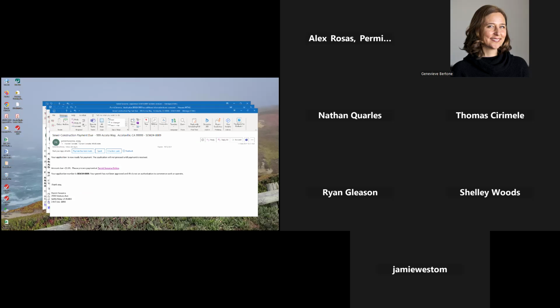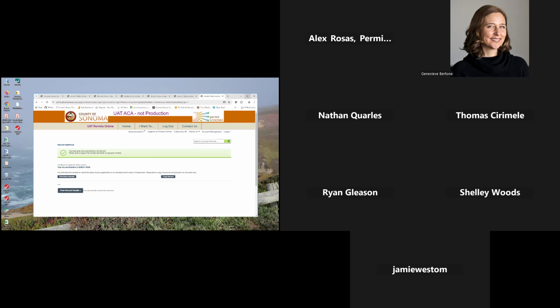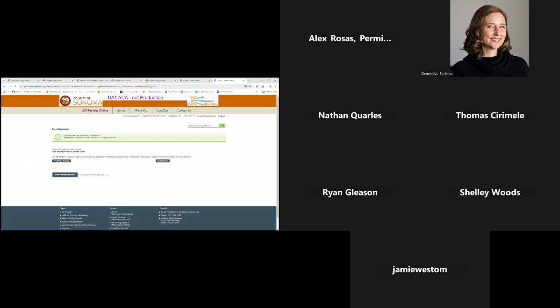While Tom is doing that, I'd like to take a moment to mention, occasionally we may have staff that process things out of order. They may invoice fees at initialization, but don't move the software along on our back end. We have some savvy customers that keep an eye on the status of their applications, and if they see fees, they may just pay them automatically. What I'd like to mention and request is you shouldn't pay the fees until you're asked to pay the fees. If you pay them prematurely, it creates some disruptions on our end.